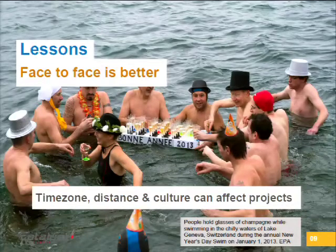But in terms of the project moving forward at speed, we always moved the fastest when we were together, when we went over to Hong Kong or they came over to New Zealand. Like in an agile project when you're in a sprint room together, it just moves faster because you can ask a question, get the feedback, get the approval that you need to go ahead, and think on your feet. Instead of having to analyze something, put it in an email, send it across, and log a ticket, which becomes tedious, and you end up more in the project management space than actually doing work in the project. So face-to-face was always better.